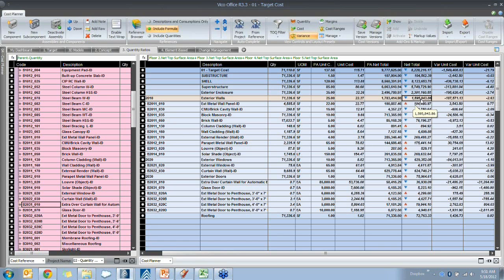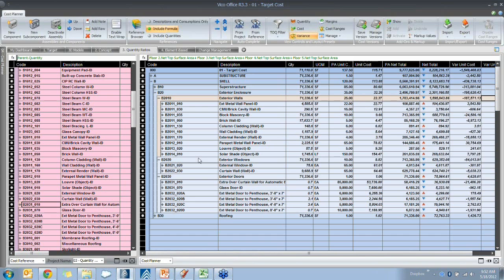When we use the ratio-based information, using the type of project cladding system that the owner has selected, it has reduced the cost by $187,000, which is a variance of $2.63 per square foot, the difference between these two. So we can start to develop more and more detail very easily, and we can use this detail in both the estimate and also in the schedule as well.